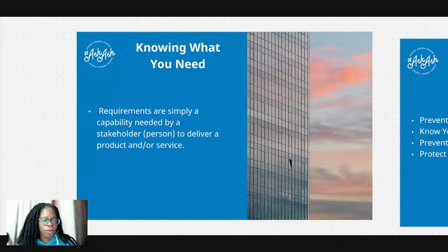Now, I'm not saying they solely come from that individual, but if you all are launching an event, a product or service, I know that you as a PM are not the primary architect of where this idea originated from. You've got the project visionary for that. So you are probably the person who's going to help pull the requirements together, and you play an important role in a requirements session to whiteboard that out and categorize the requirements into must-haves, would like to have, nice to have, doesn't really matter. That's a different type of discussion, and maybe that's next week as we close this series.